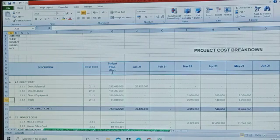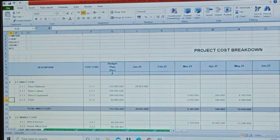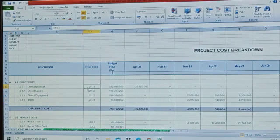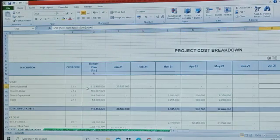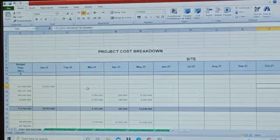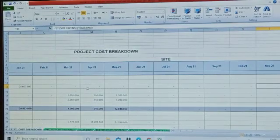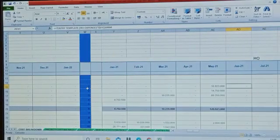The project cost breakdown. In this section you will see a comparison between the budget plan and the cost incurred during the project, then divided into two sections: site office project cost and home office project cost.